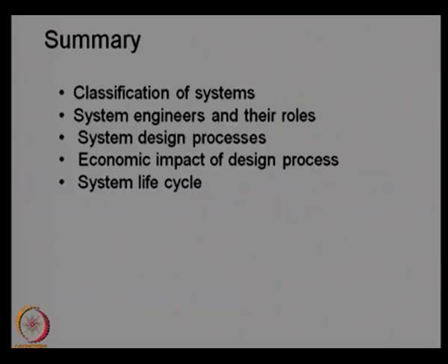So what are the different phases in the life cycle, and which are the phases which really affect the economics of the project, as we saw that 80% of the cost is locked in by the first 3 phases in the life cycle, and only 20% of the cost is actually accounted in the remaining phases. And so we saw the life cycle impact of the system and how the system engineering process takes place in the industry to ensure timely delivery and quality delivery of the outputs.